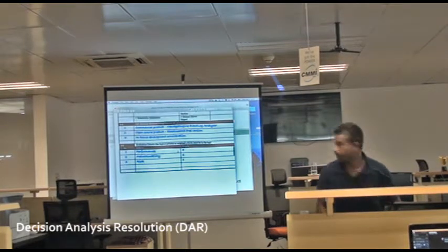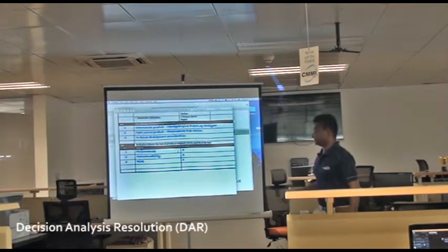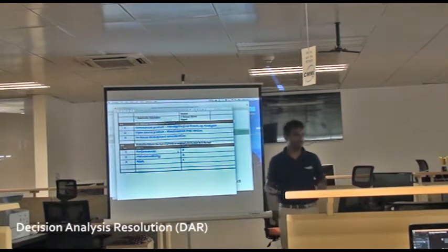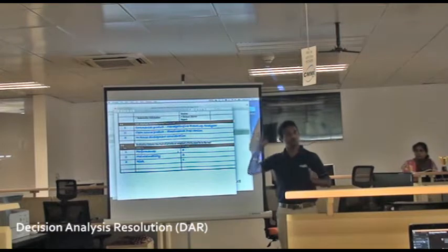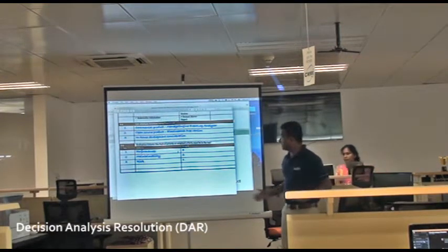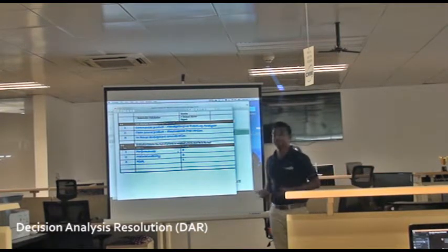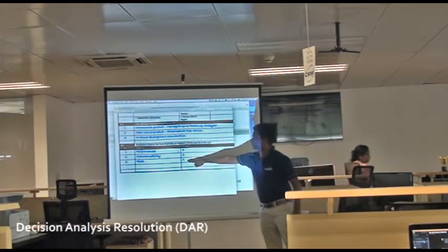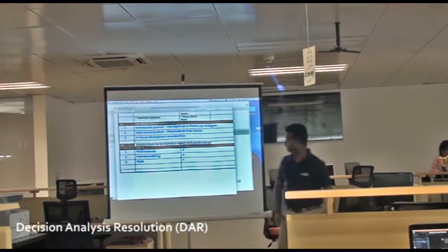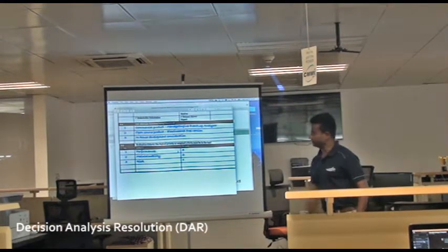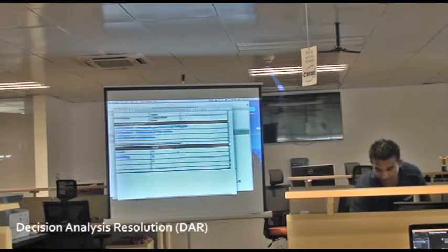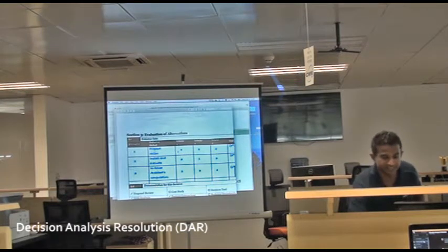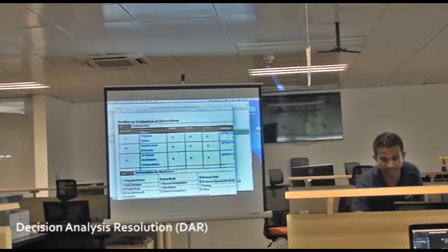All right. Then the evaluation criteria. What you are looking at in the solution here: I need performance, so I need to give it high priority, and then I'm looking at maintainability. Risk is my lowest, so I put it as weight in the third. So my priority is performance. Okay. The third section is the evaluation of alternatives.